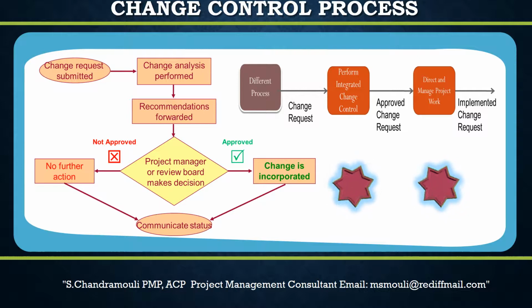3. Reviewing and approving requested changes. 4. Managing the approved changes, when and as they occur, by regulating the flow of requested changes. 5. Maintaining the integrity of baselines by releasing only approved changes for incorporation into project products or services, and maintaining their related configurations and planning documentation.